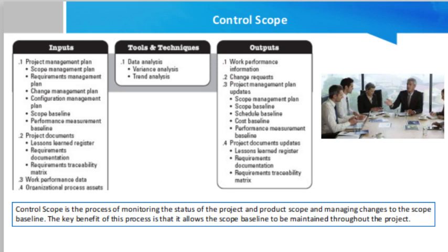Requirement documentation. The project requirements should always be traceable, testable, measurable, complete, consistent, and importantly acceptable to the stakeholders. To ensure this happens, the requirements should be well documented to make it easier for the project manager to detect any deviation in the project. Requirement traceability matrix. The requirement traceability matrix is a tool that helps in detecting and identifying the impact of any changes that cause the project to deviate from the projected scope baseline and deliverables.